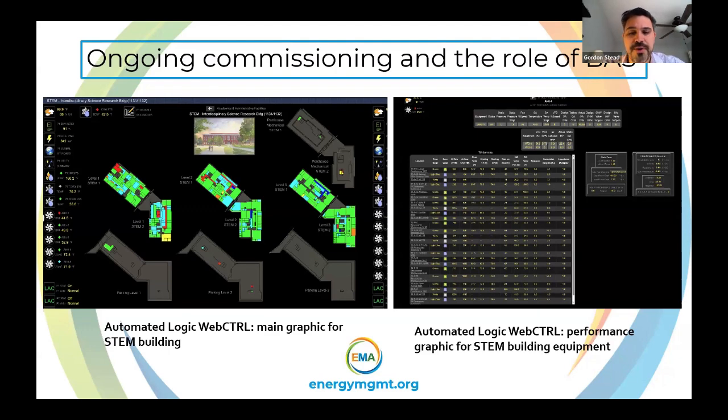And when you upgrade that, you want to avoid obviously putting new control systems on old air handlers which are going to be replaced. That's another complexity, is timing those renovations.